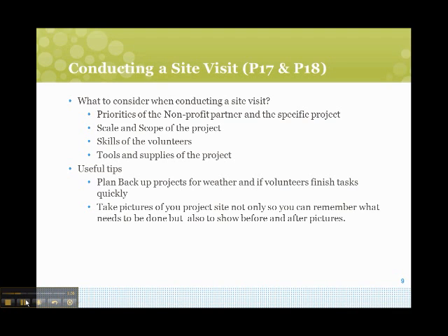Consider the number of volunteers and the level of skill they will have. In this case, it is best to consider volunteers as relatively unskilled when it comes to painting, gardening, or landscaping. Remember that the task you decide on must be something that can be reasonably accomplished in about 3 hours and done by volunteers, not skilled laborers. Consider the volunteer skill levels. Is the work appropriate for beginners? Can anyone do it? This should be an important factor when deciding exactly what you will be doing on the day of.